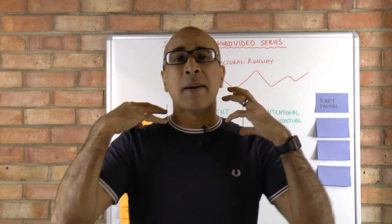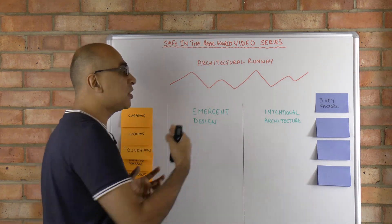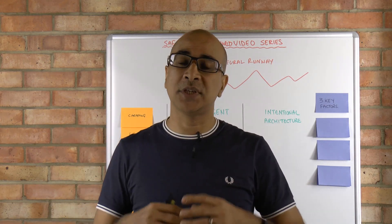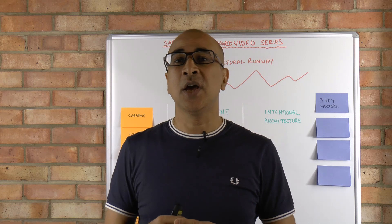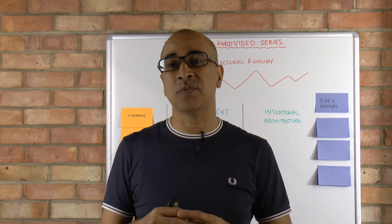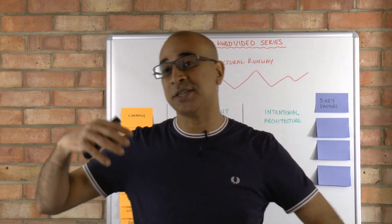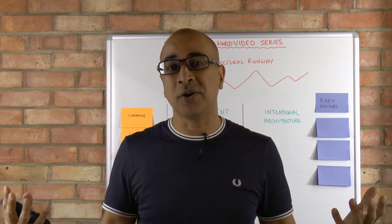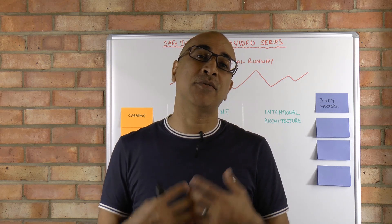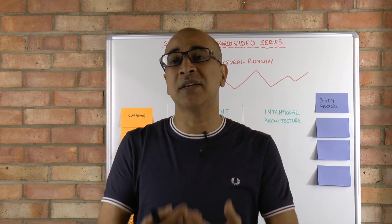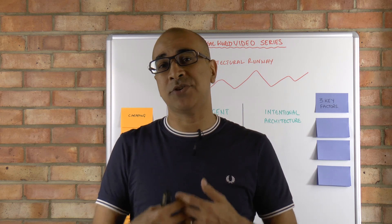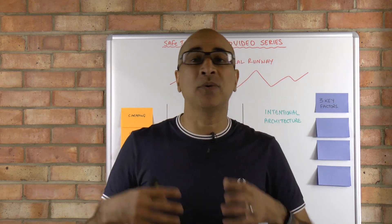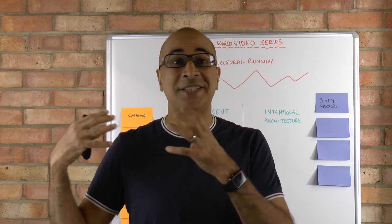If you have too much emergent design, you end up with another problem. You could have an inconsistent approach because the teams are working at odds with one another. You could have a lot of regret cost when you find out one team is building something one way and another team is building it differently, requiring a lot of rework. You could also have a lot of redundancy and replication, which leads to inefficiency both in terms of the solution and its maintainability.